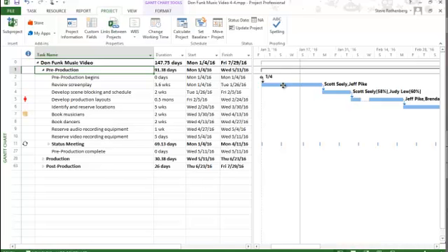For instance, if you're mixing adhesive and it takes a certain amount of time to set, you'd better have started getting all the things that you're going to glue lined up, because if you start later, your adhesive might be dried out before you get to the point where you can actually apply it. So those relationships happen all the time in software development, construction, and other endeavors as well.